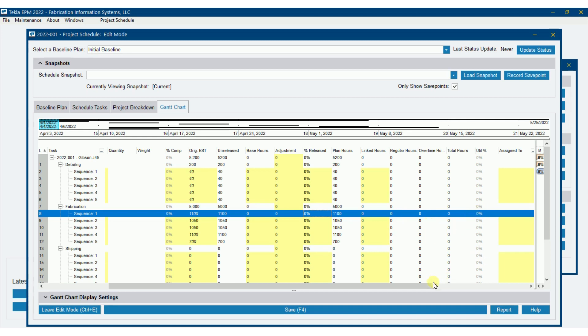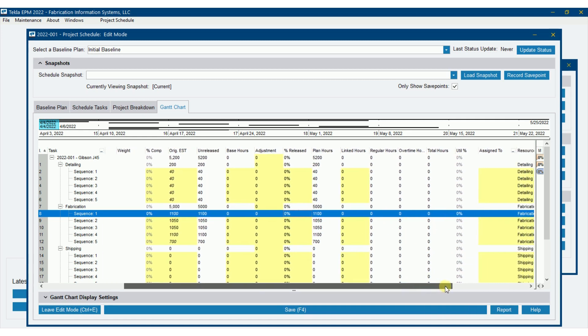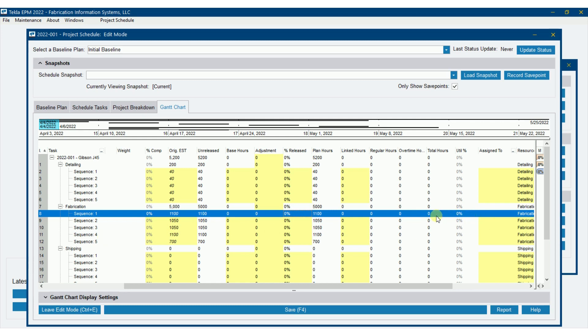Utilization percent, we'll illustrate this later, but it's basically the number of hours that we've actually utilized. So if I had 100 hours on sequence one, I've worked 60 hours, my utilization would be 60%. We'll illustrate this as we go down further.